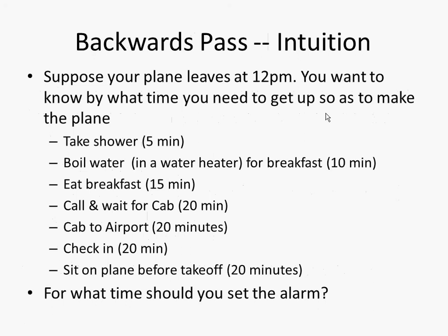So you've got to be checking in 40 minutes before, so that's 11:20. You've got to call and wait for the cab 20 minutes before that, so 10:40. You've got to eat breakfast starting 15 minutes before that, 10:25.